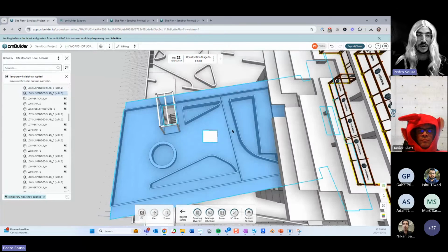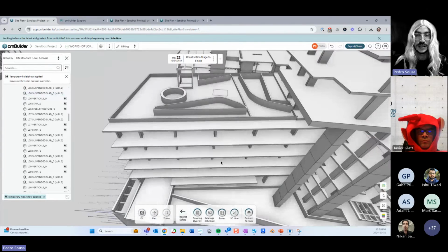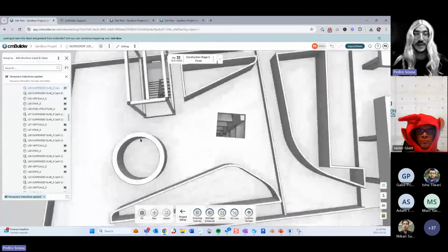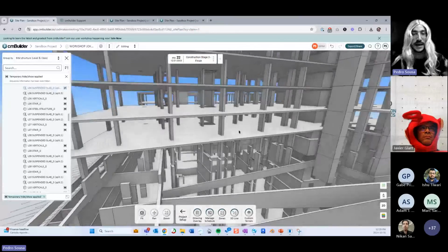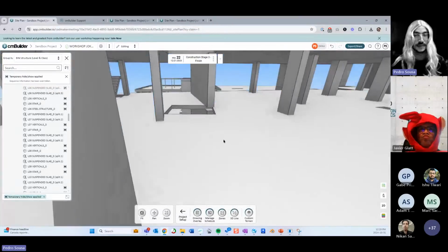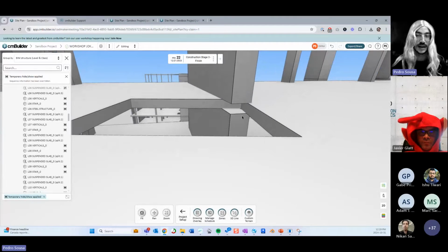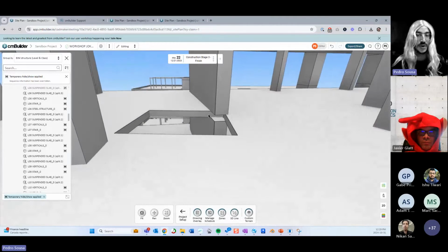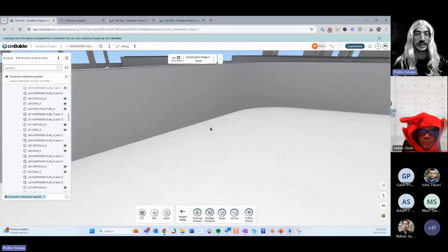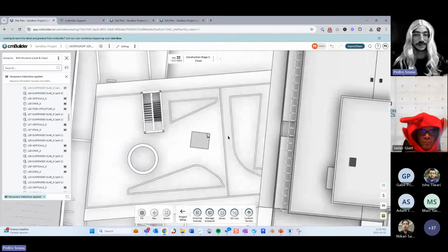So every time that you're creating your sequencing for these amenity levels, you can just keep these parts out. And then in the end, you just bring them back again to show that you were actually filling them back in. Right. And it's a great tool because you can check things like how your construction analysis of placing of the crane will impact the design, right? So it's a great way for you to visualize these elements in context.